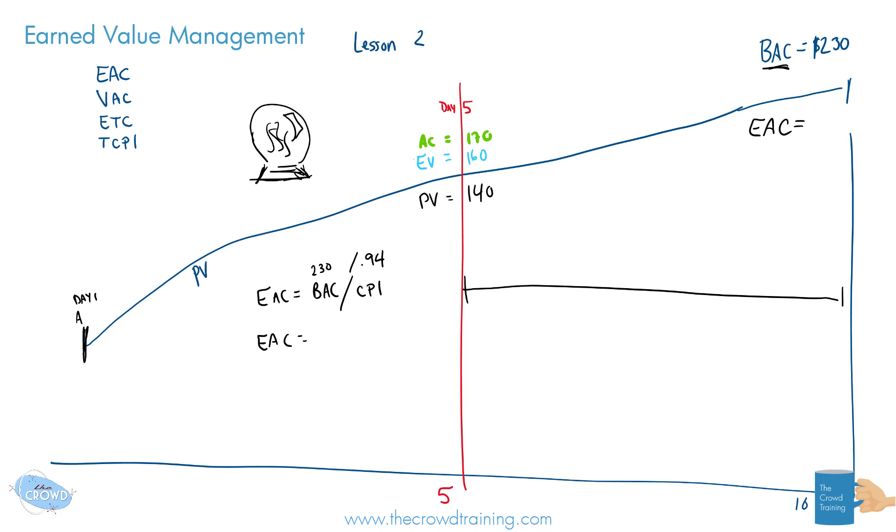Let's take a look at the other equations first. Another equation is to take the actual costs up to this point plus that budget at completion, subtracting anything that has been earned up to this point. So we've actually spent $170, and the budget at completion was expected to be $230, and we've already earned $160. So by that measurement, if we were to take, I'll do a different color here, so $230 minus $160 gives us about $70 left. And that's $170 here, equals about $240.